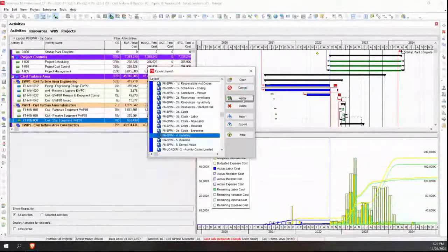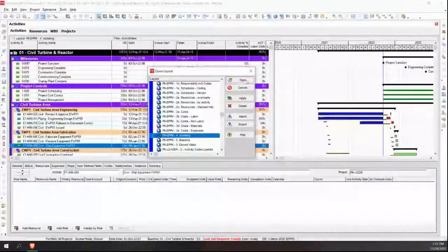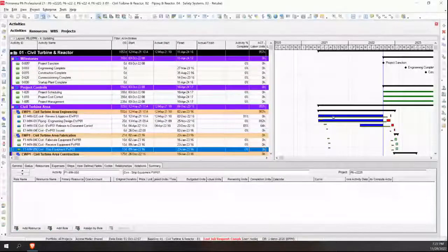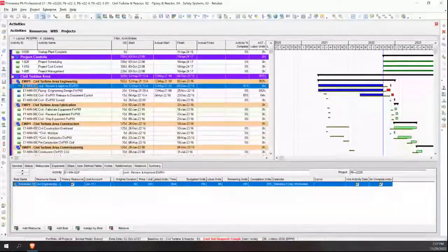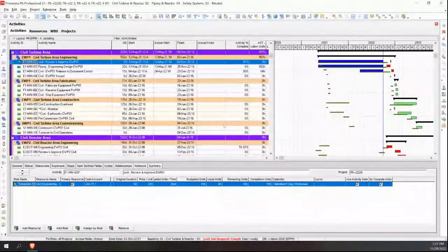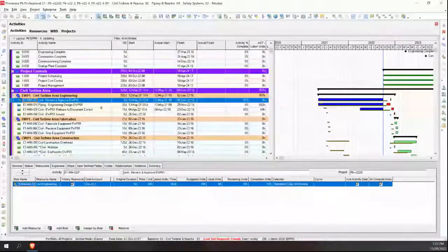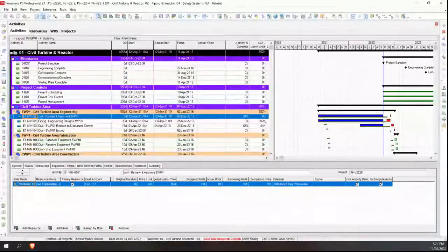We, of course, can do updating. So you want to do different updating. And some of you might have noticed some of these bars are blue. So these ones are in progress. So they've started. These activities haven't started as of yet. And if you see one that's fully blue, it's been completed. Okay, so those are sort of the three different statuses.